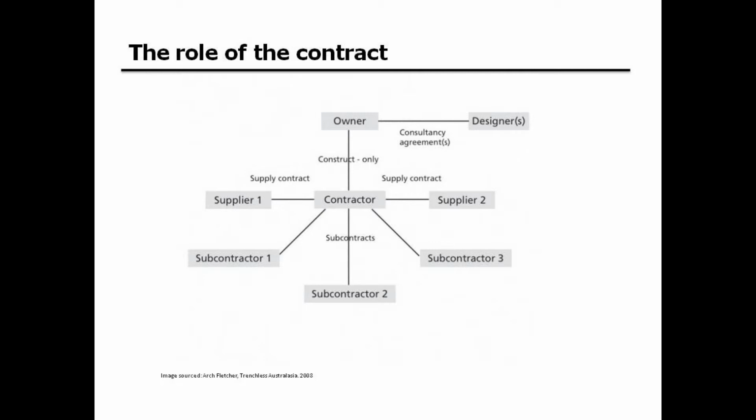The essential difference between these extreme forms of contracts is the carrying of the risk, the profit and the loss, and similar incentives that are built into the contract to encourage the contractor to provide an efficient and economical service to the client.